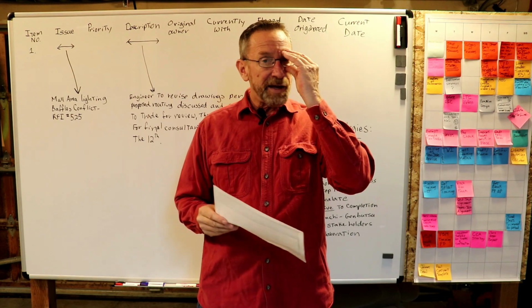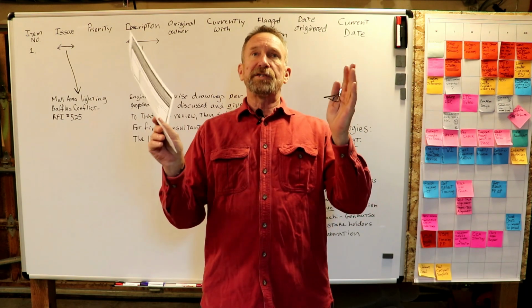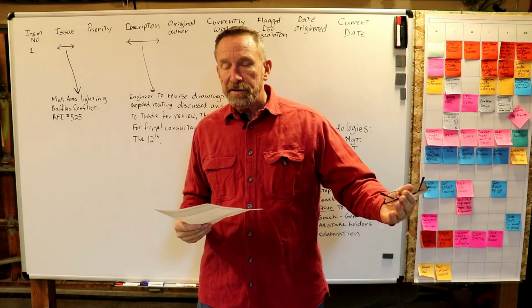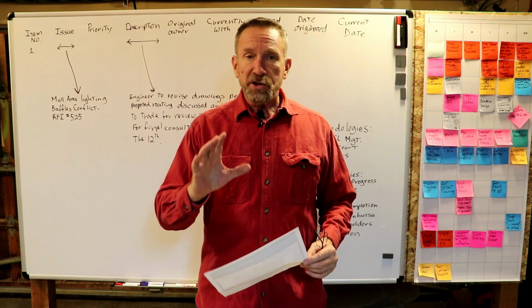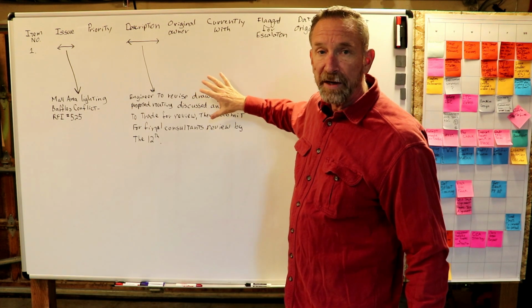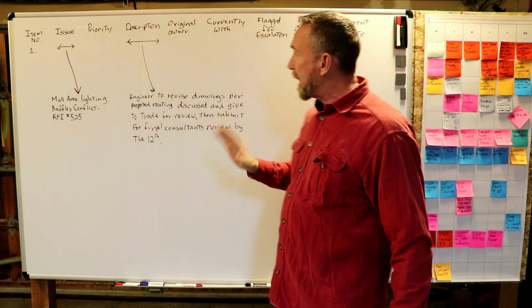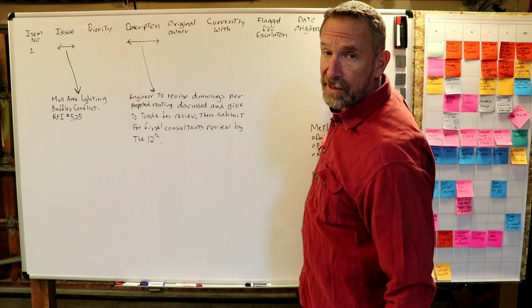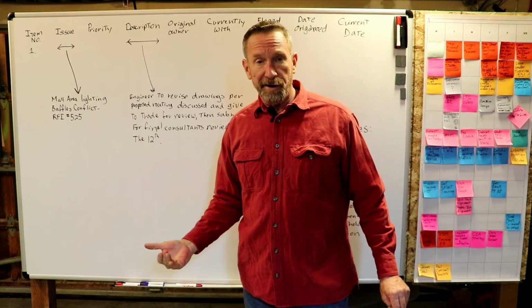And then it goes on to say we will all get together as a group, all the stakeholders will walk out, we'll stand there, we'll look, we'll make sure we understand exactly what the issue is, we'll have our drawings, we'll have our specs, we'll have everything with us and everybody with us so that we can actually go solve that problem. Each one of those items is captured by the owner of the issues log, and that person puts them in the description, and they actually manage who currently has it, what the date is that person has agreed or committed to get that done, and then monitors to make sure that they are getting it done.